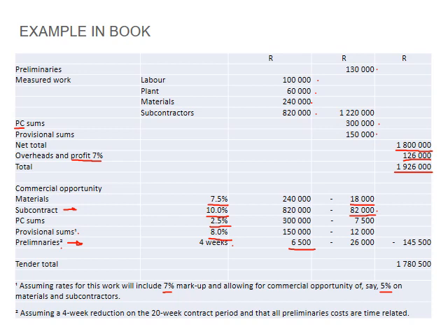So please remember that. So this is where you actually can have the biggest competitive edge on other contractors. So all these possible savings are added, and you subtract that from your contract amount. So effectively you are 145,000 Rand more competitive towards your original estimate that you had, and that is basically how you mitigate your risks.